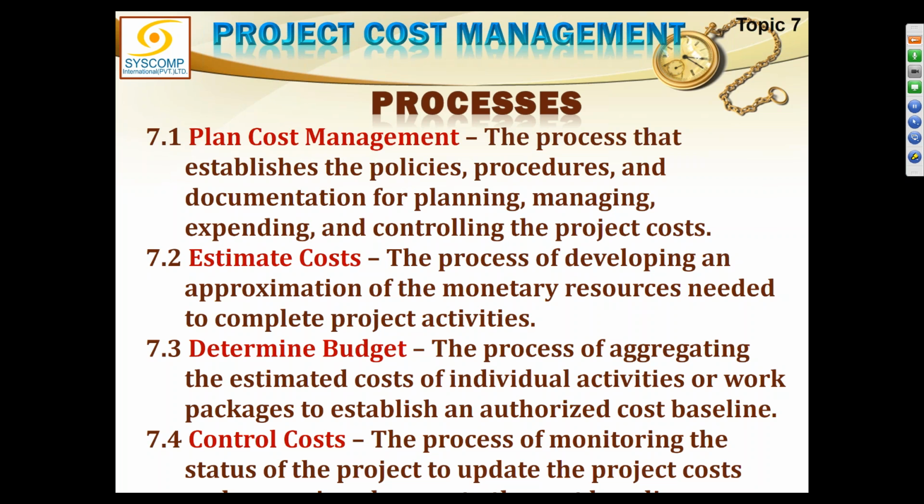That is called the planned value of that activity, or you can say the budgeted cost of work scheduled. For that specific work, this is the budgeted cost, the assigned cost, the planned value. And now when we control the project, control the cost, we will consider this amount because we should not be spending more than that. But actually on the ground, when we execute the project, the money which will be spent might be different.